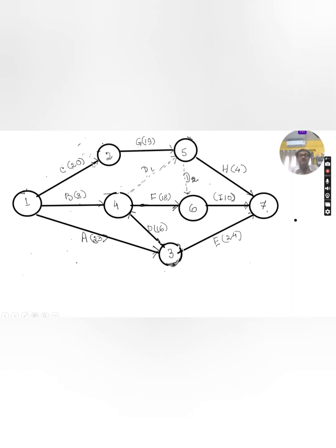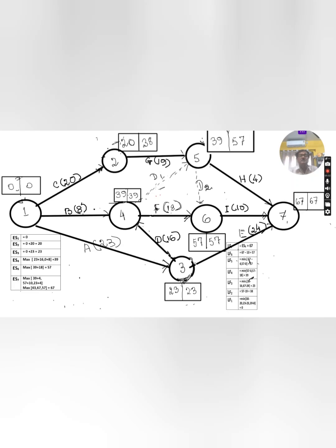So this is the network, drawn with the time durations of the activities given. Now we have to discuss how we develop the critical path for this project. What we will do: first determine the earliest start time for each activity. ES1 means earliest start time of this node. ES2 means earliest start time of this node. And 1, 2 is the activity which is connected by these 2 nodes. So first of all, we have to find out the earliest start time for each node.